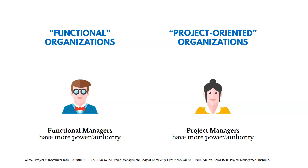In organizations, we really have two ends of a spectrum — two different types of organizational structures. On one end, you have functional organizations where functional managers have more power and authority. Those could be the head of accounting, head of marketing, the vice president of construction. On the other end, you have project-oriented organizations where project managers have more power and authority. In a functional organization, getting the resources and budget required to get the work done is probably going to be a little bit more challenging.